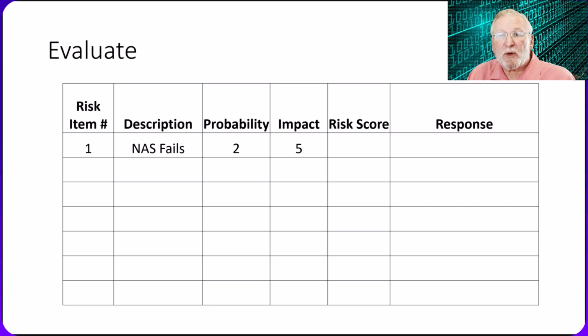We would create a spreadsheet similar to this and begin entering our tasks, including estimating probabilities and impacts. Remember that these are basically guesses, but experienced project managers have experience, and so these are educated guesses based on experience. And when it comes to equipment failure, the manufacturers often have published specifications such as MTBF, or mean time between failure, that you can go on.